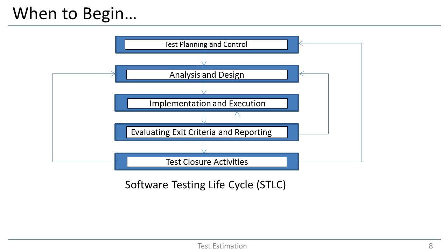This information may also contribute to a post-implementation review, which may be organized by the project manager at the conclusion of the project. As discussed, test estimation starts at the beginning of the test planning and control phase. It is further developed in the analysis and design phase. After that, you are mainly performing the test activities, but you should keep a check on your estimates to identify any deviations from the effort and to raise a flag immediately.